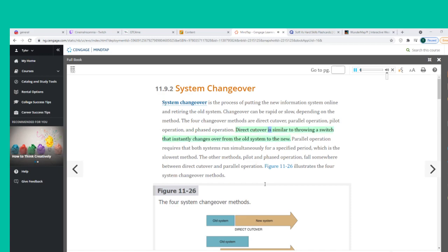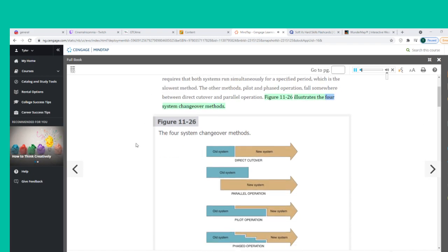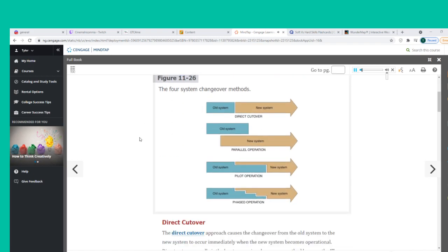Direct cutover is similar to throwing a switch that instantly changes over from the old system to the new. Parallel operation requires that both systems run simultaneously for a specified period, which is the slowest method. The other methods — pilot and phased operation — fall somewhere between direct cutover and parallel operation. Figure 11-26 illustrates the four system changeover methods.